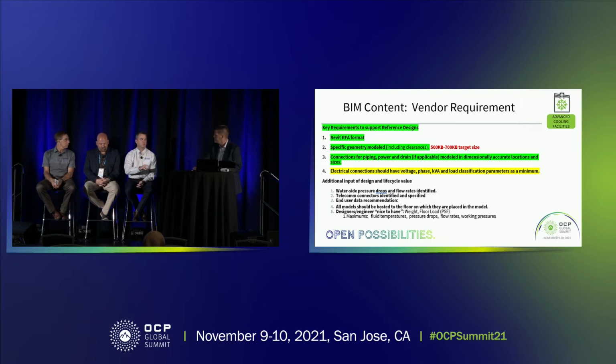The last thing I want to throw in there, Don, 10 seconds, is John mentioned there are consultants out there that specialize in doing BIM content development. Typically, to develop an immersion tank or something along those lines to the level that the industry is looking for, you're probably talking about maybe 10 hours of contracted time at somewhere around $100 to $125 an hour. So under $1,500 as a manufacturer, you're getting a BIM file for that product. So that's a big thing for an engineer.